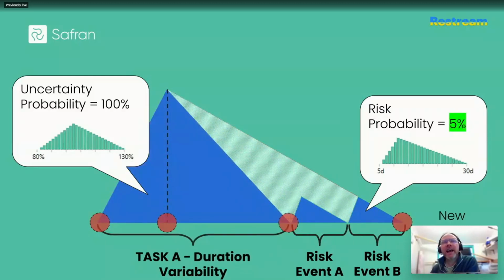So this is how I've often built risk models, as it helps manage expectations. Go big with your estimating uncertainty to begin with, and then sculpt it down, break it down into its constituent parts of hypothetical events that may or may not occur. And by shaping the model's inputs in this way, it helps us to see what is driving the output and allows us to pinpoint where the problem area is really coming from.